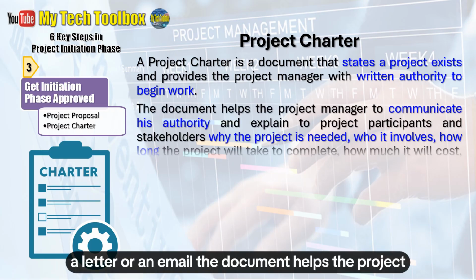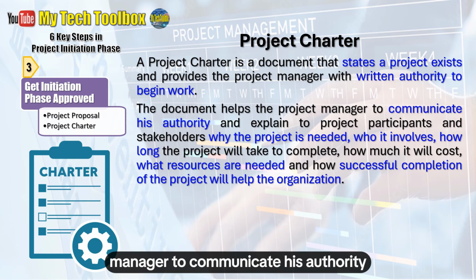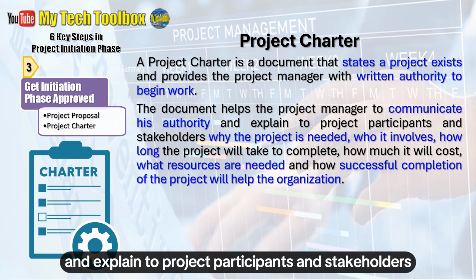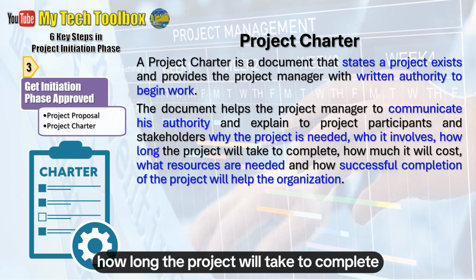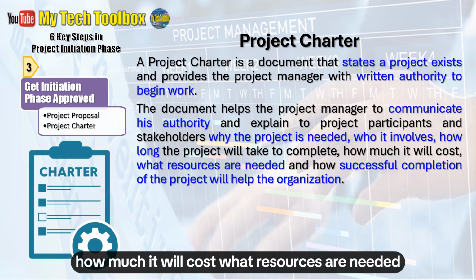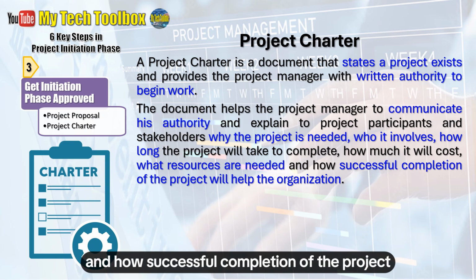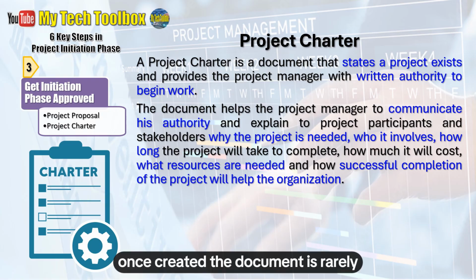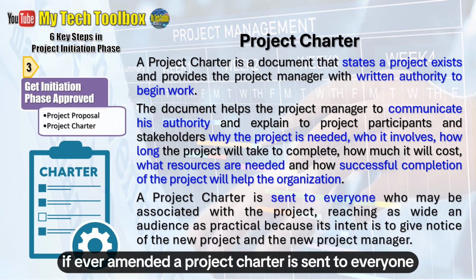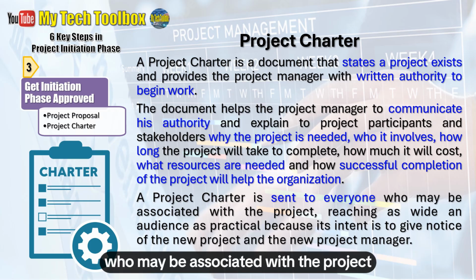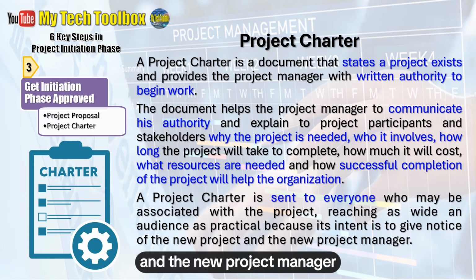The document helps the project manager to communicate his authority and explain to project participants and stakeholders why the project is needed, who it involves, how long the project will take to complete, how much it will cost, what resources are needed, and how successful completion of the project will help the organization. Once created, the document is rarely, if ever, amended. A project charter is sent to everyone who may be associated with the project, reaching as wide an audience as practical because its intent is to give notice of the new project and the new project manager.